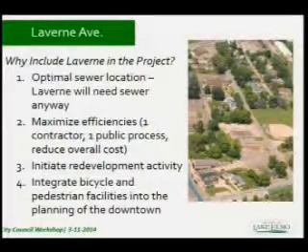It also would allow for minimized disruption. There's certainly going to be disruption as part of this project. There's always pain with construction. But by taking the trunk sewer out of that really key downtown section of Lake Elmo Avenue, you might be able to cut that construction cycle a little bit shorter and kind of minimize the pain to a certain extent.